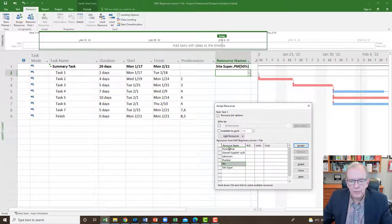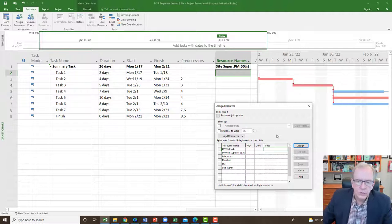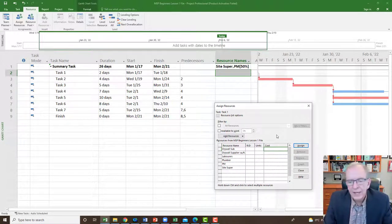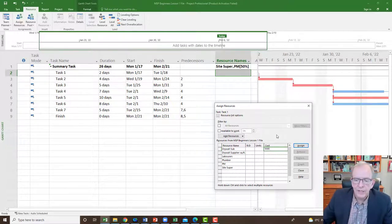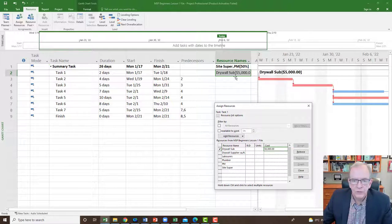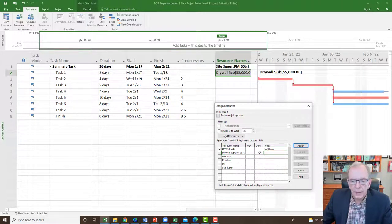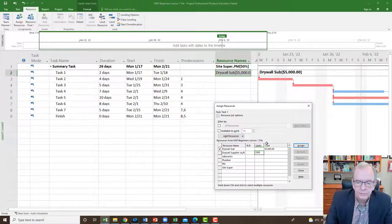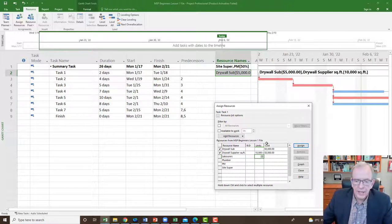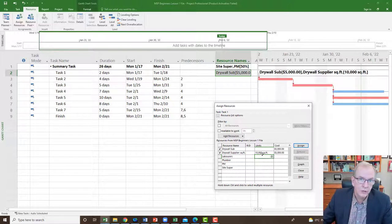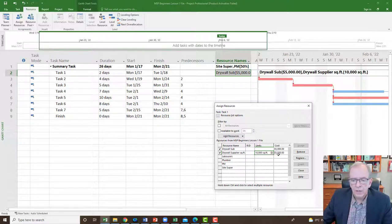For task one, I'm going to assign the drywall sub — they're a cost type, so I'll enter a cost of $5,000, which I intend to pay at the end of task one. For the drywall supplier, I'm going to order 10,000 square feet. If I put 10,000 in units and press Enter, it calculates $5,000 — because 10,000 square feet at 50 cents per square foot equals $5,000, matching what we put in the resource sheet.